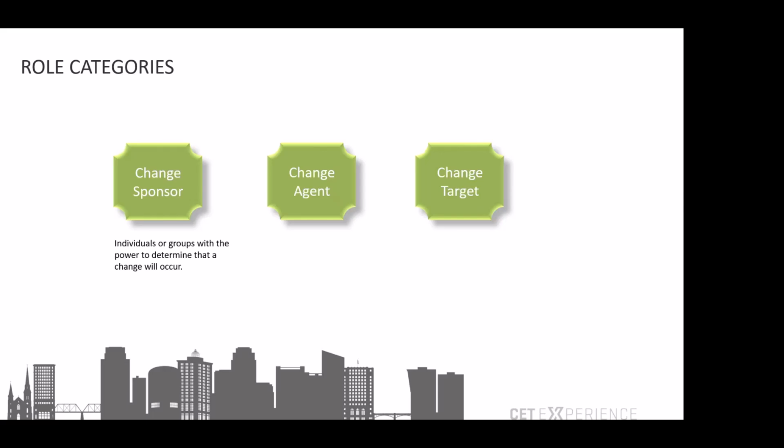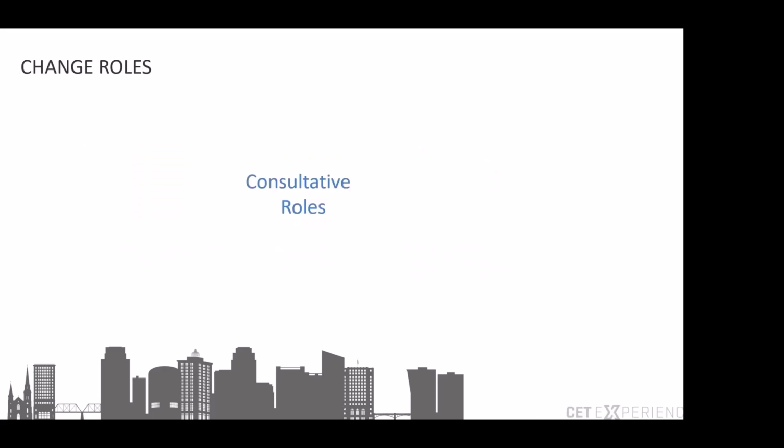Change sponsor is going to be more of an executive or leader level that's really advocating for the change, and they're really, I'll say, your change management backer, right? They're the ones who are going to shout it from the mountaintop. You have a change agent. These are the individuals who are actually executing the change. They're actually facilitating the change. So they are helping the change targets, and then they're communicating with the change sponsors. They're really the ones advocating and guiding and mentoring. Change targets are those individuals who are actually having to change the work they do, right? They're the ones that have to change. That's your change target. Really straightforward and simple, you guys, not really complex.